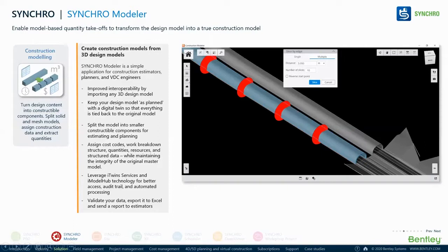A lot of times, some of you are involved in linear infrastructure projects, and you have come across a suggestion from the consultant that you wanted to break down the infrastructure project in a constructible format. Let's say you are doing a road project. Let's say you have only 4 layers. For simplicity's sake, let us understand you have a base layer, then you have subgrade 1, subgrade 2, and then wearing course and bitumen. But at your site, first your base layer will be laid, then your subgrade 1, then subgrade 2. The entire road cannot be cast at a single time.